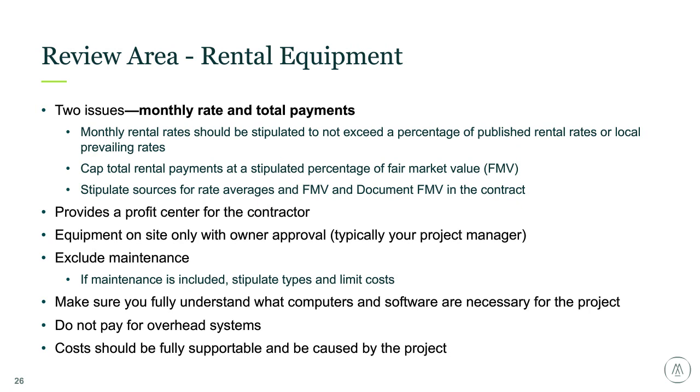Another area that we see often is computer and software charges that are directly charged to the project. So if someone's charging their financial operating system to the project, that sounds pretty indirect to me. So if you have good contract language, you can make sure that you have a very defendable position to say, hey, this is not allowable.